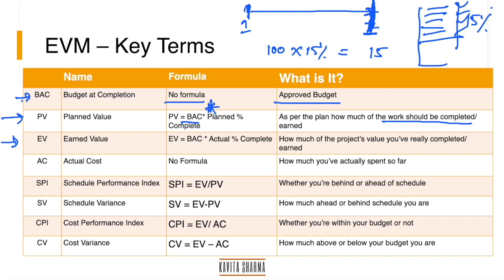Earned Value is how much work you have really done — how much project value you have actually completed so far. On day seven, your team might have completed 10%, 20%, or exactly 15% as planned. It could be ahead, behind, or on track.